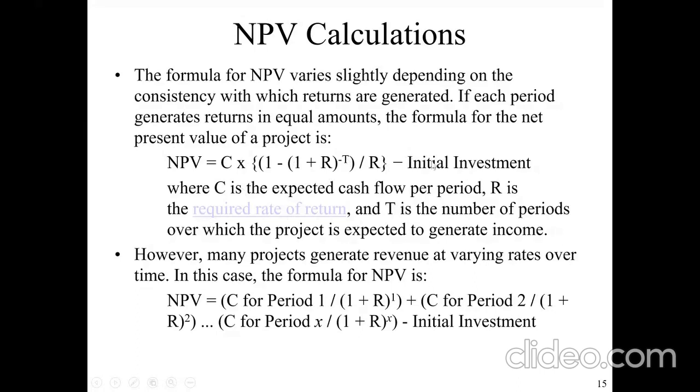Then we subtract our init. So this is where the difference comes in. This part of it will give you the expected cash inflow. Then this is the investment that you are making, so your cash outflow. So when you do this subtraction and you get a negative value, it means what you are spending will be more than what you'll be getting. For that matter, it will not go in. When it is positive, it means you'll be earning more than what you are going to spend.